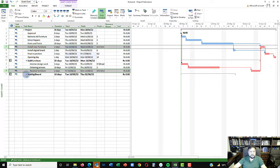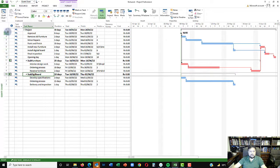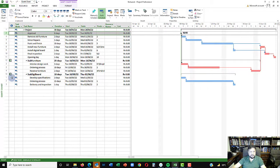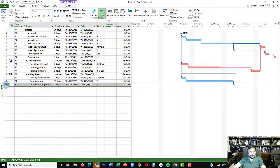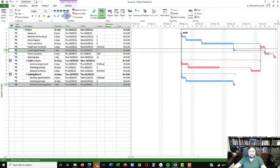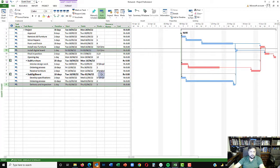For the digital board sub-project, the same approach applies. Once we have the approval, we can develop the specifications. And once we have the delivery and inspection of the digital board, we can install it — so the link goes from 'delivery and inspection' in the sub-project to 'install digital board' in the master project. The activities are now linked and you can see the critical path. Notice that the 10-day delivery time for furniture puts the furniture sub-project on the critical path.